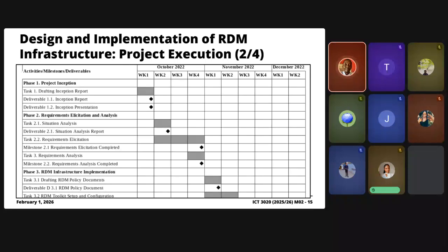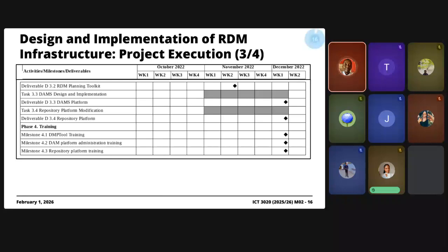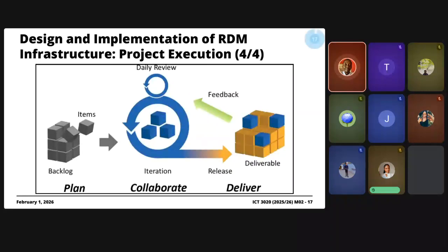So maybe each sprint will be a week in duration, it could be a week, it could be 2 weeks, but the idea is in each sprint, every week, we are providing the client with a partial representation of the system, some version of the system, not complete, but some functional aspect of the system. That's the idea behind this software process model.